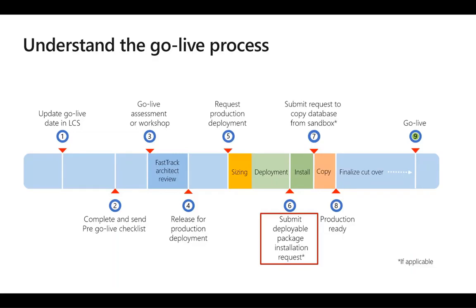We should plan accordingly and perhaps perform this task during off hours. For package installation, depending on the number of packages, it could take a minimum of 5 hours lead time and 4 hours downtime for each package.